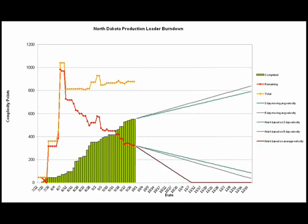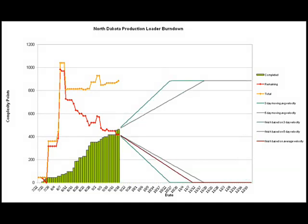Let's go back to a burndown from the middle of the project so we can see these more clearly. At this point in the project, we had completed 464 points and had 420 points left to complete. The spreadsheet that generates this chart calculates several versions of velocity. Velocity is a number that expresses in complexity points per day how fast the team is moving. Instantaneous or one-day velocity varies quite a bit, so that isn't very useful. Instead, we calculate several different velocities.